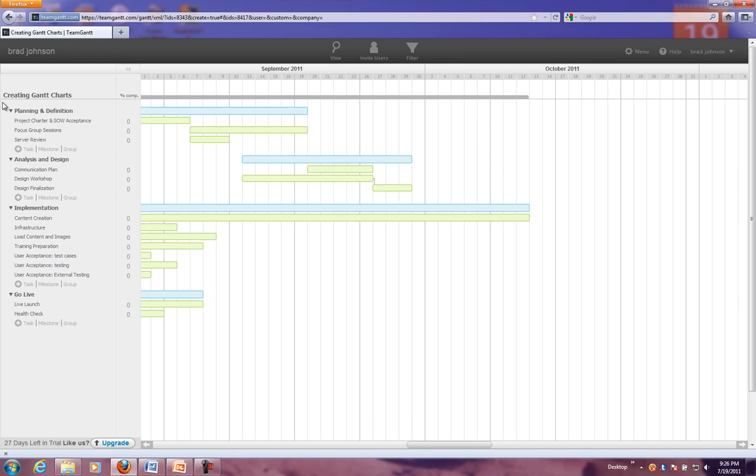We see at least one dependency, and really there should be one from project charter to all of these others. Nothing can start until this one's finished. That would be a lot of lines, so we'll leave that for now. But we can really move these around, and at a glance it gave us a sense of which things were dependent on others, how many people we needed on the team, and the consequences, remember the communication plan, of having one person do multiple roles within the project.